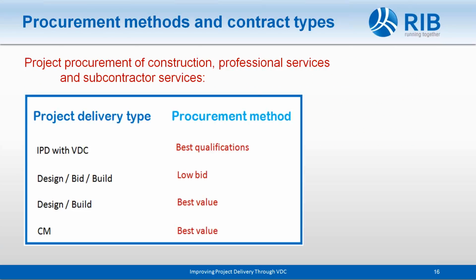Okay, let's look back at the project delivery types again. IPD using VDC, that's going to use that best qualifications method for procurement of the designers, contractors, subs, engineers, etc. Design-bid-build is going to use the low bid method.